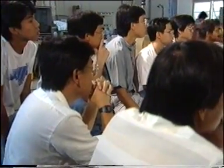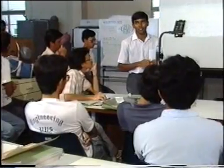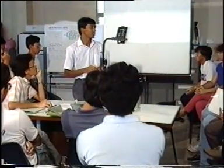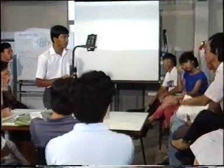Every Saturday morning, progress reports are presented by the management group to the rest of the team members. Together, they review difficulties or problems encountered during the week on project monitoring and reporting, quality control, safety enforcement, and disciplinary control.